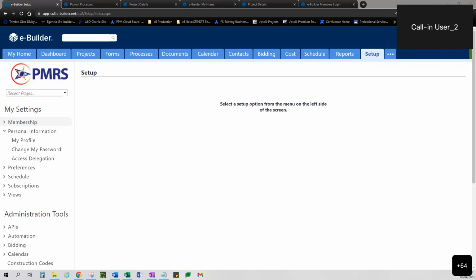I would like to make a mention of the local aid resolution submission and agreement execution process. That process is automatically created when a project makes it into PMRS, which means when you submit the application for municipal aid or any of those programs, after the submission, we do have an integration build that is run every night, so it will get created in PMRS the next following day. And you will see that project and process associated.